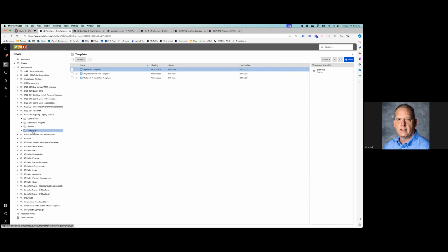And then last but not least, I mentioned that one of the goals is to have consistent practices. As part of this setup, there's standardized project templates, and really there's two, one for agile projects and one for waterfall projects. And so all this stuff goes to the project manager. It's set up and ready to run when they get it, but they can swap in these different plans if they want to or need to. And usually I at least have a brief conversation with them about that. So that's kind of what it looks like, what it contains in the back end.